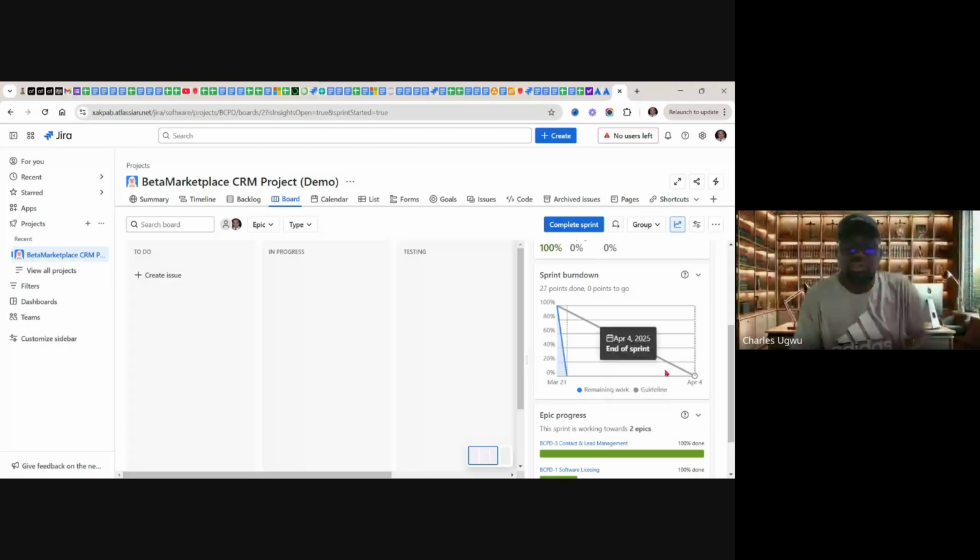You must finish by 4th of April, but you can see in our own case, we've already finished by this time, which means we finish on time. And if we are finishing on time, it means that we are underutilized, meaning that next time we will have to grab more work items, but for the purpose of lessons, that's why we finish early. But if everything being equal, we should be able to finish by 4th of April.